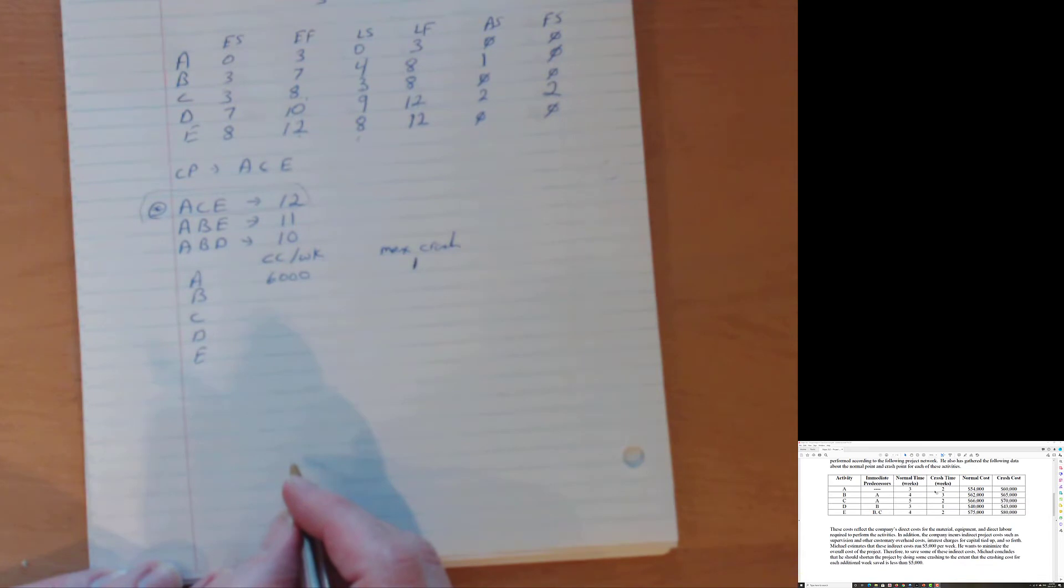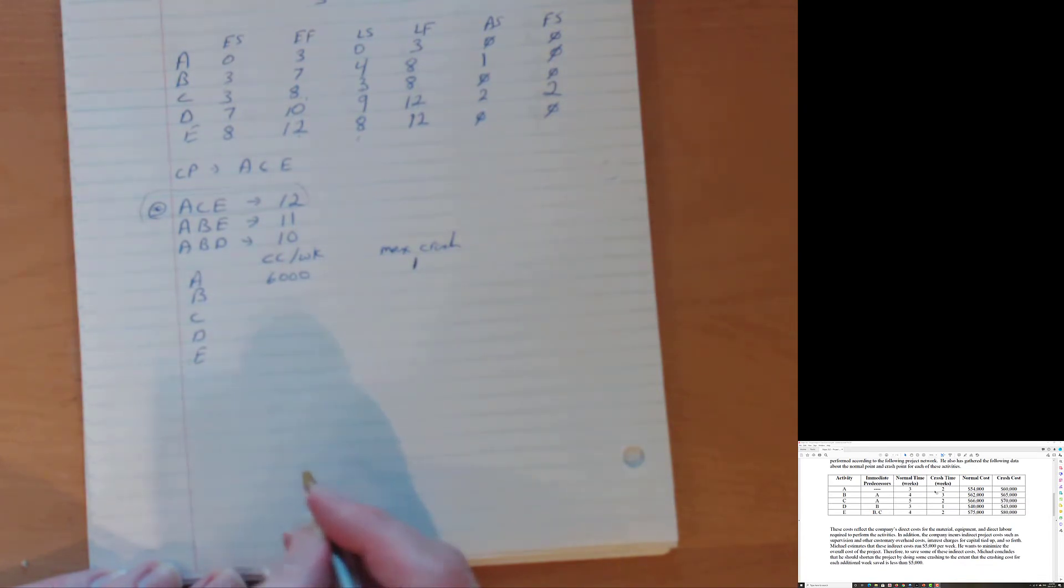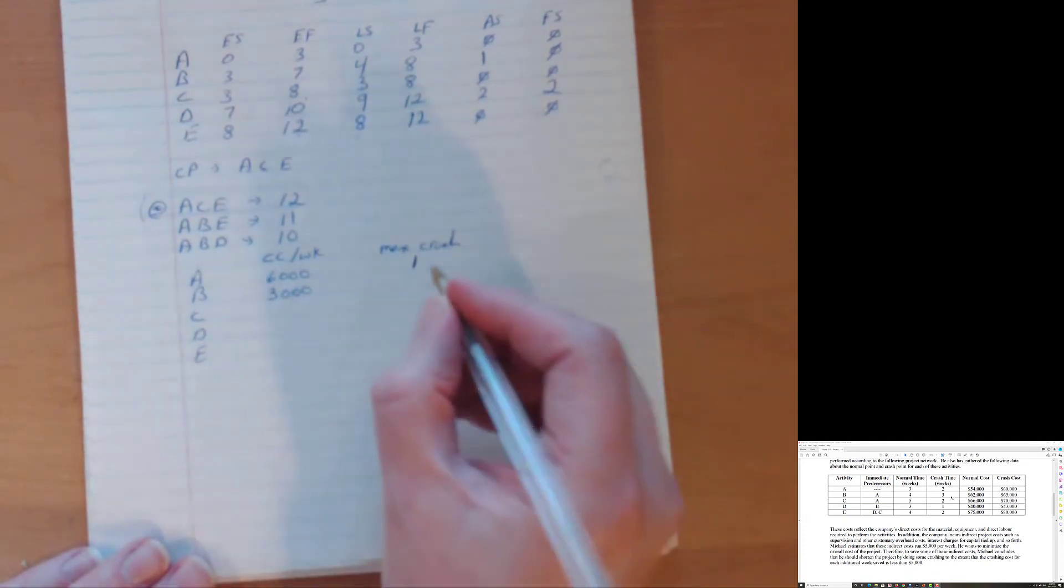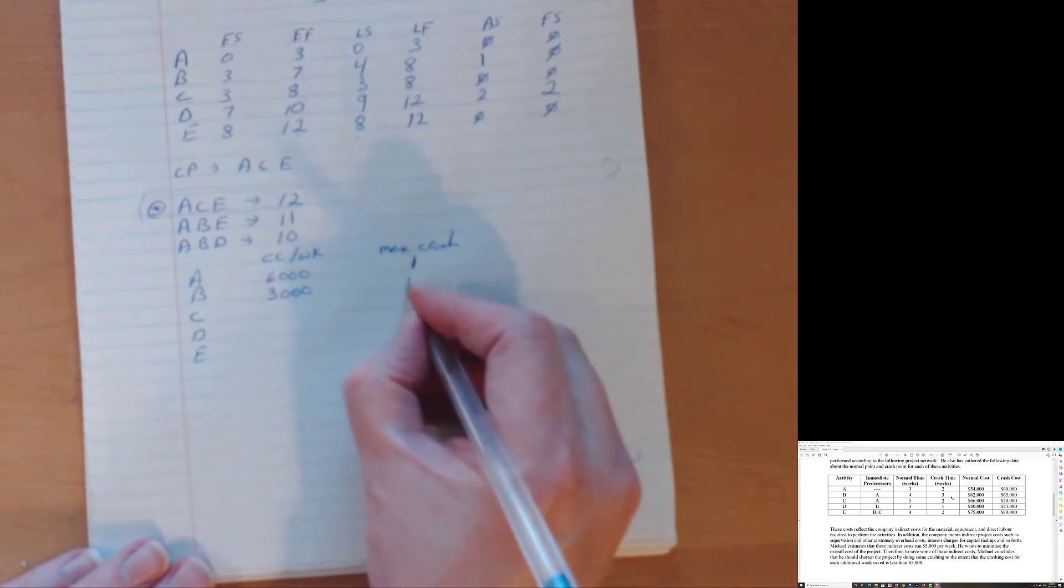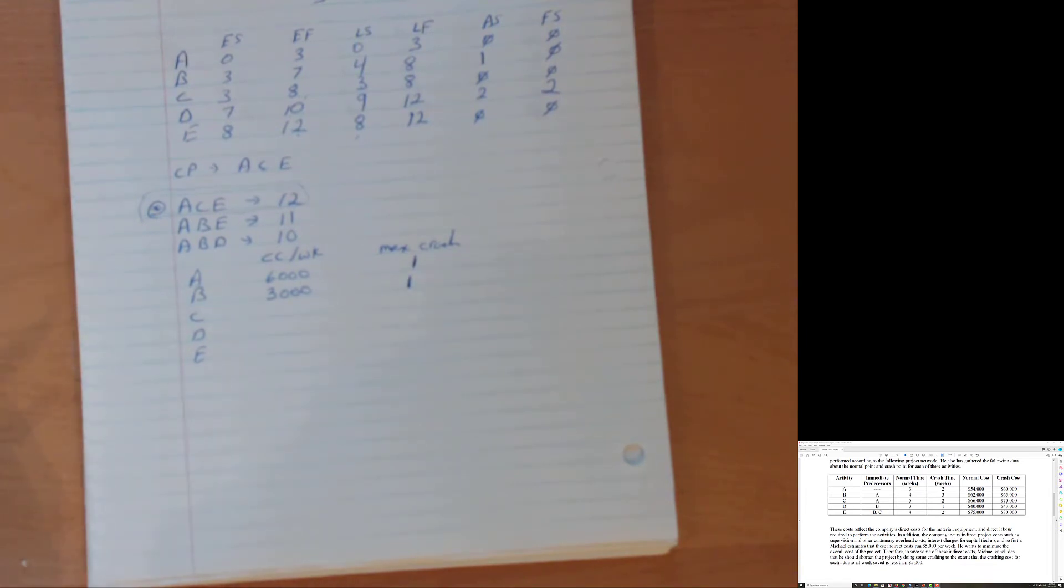B on the other hand, crash cost is 65,000 minus the normal cost of 62,000. That's 3,000 divided by four minus three. So 3,000 divided by one is 3,000. And we can see that we can go from four weeks to three weeks. So we can crash B one week. Just following the formula from the slides. For C a little bit more interesting, we have 70,000 crash cost, normal cost is 66,000. So it's a differential of $4,000.